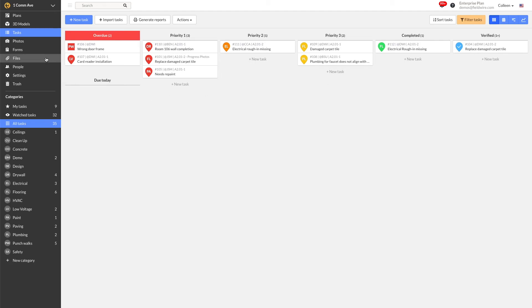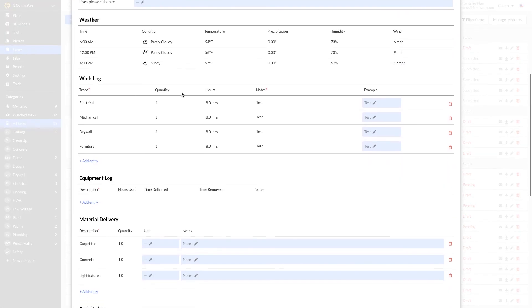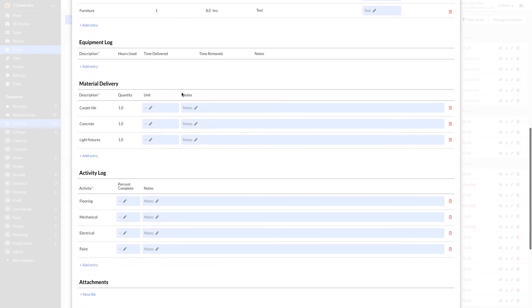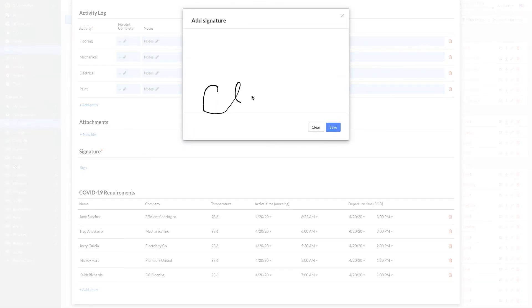The last thing that I do every day is review the daily report from my superintendent. Right now, it is especially important that I sign off on the section that indicates that none of the workers on site have a high temperature. I'll review the work log, equipment log, any photos that are attached, and lastly the temperature table. I'll throw my signature on the form and then email it out to my safety director.